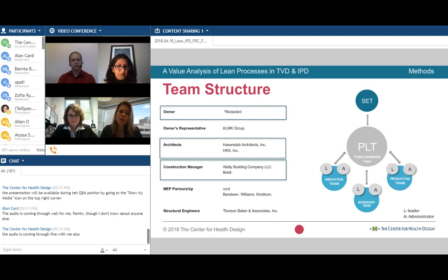We reported up to a project leadership team. In traditional terms, think about the project managers on your job. We reported our recommendations for what was on the project up to those groups. If there were any issues, the project leadership team would report up to a senior executive team. But most of the time that was only dispute resolution, or if we were doing some things beyond scope, or maybe altered some of the goals on the project. But for the most part, everything was taken care of at the team level and the project leadership team level.